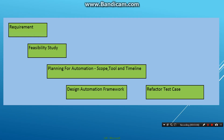Once the feasibility study is done and approved, it goes into the planning stage where a test plan — an automation test plan — is created, probably by the test lead. Stuff like scope, what is in scope and out of scope, timelines, the tools to be used, and resources are all taken into consideration, and a plan is made with different milestones.